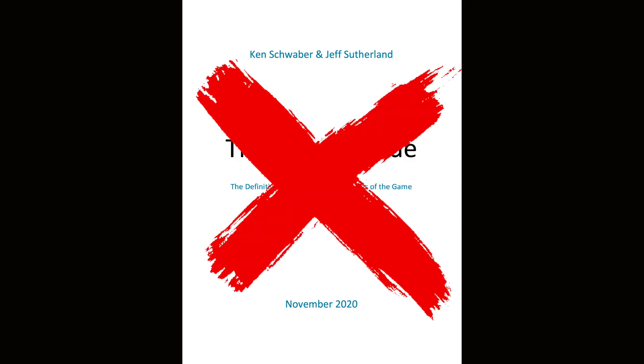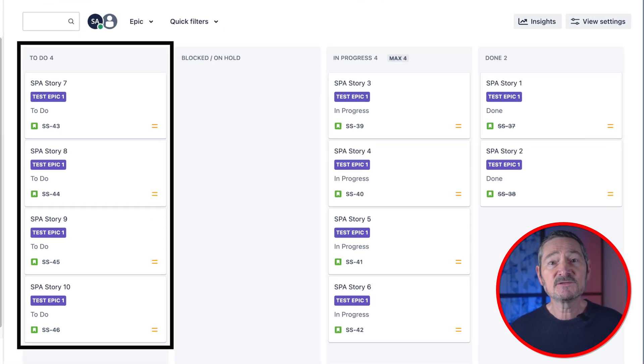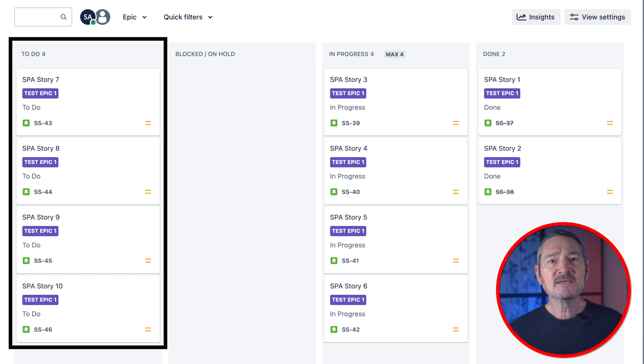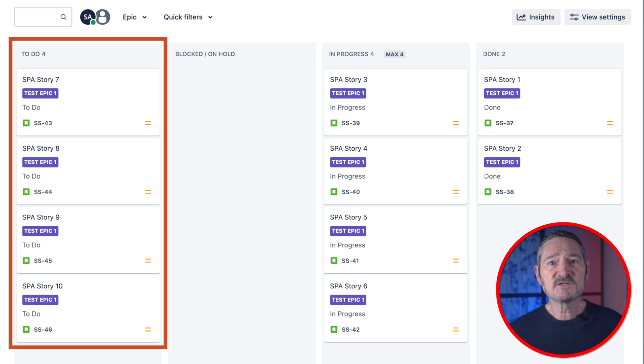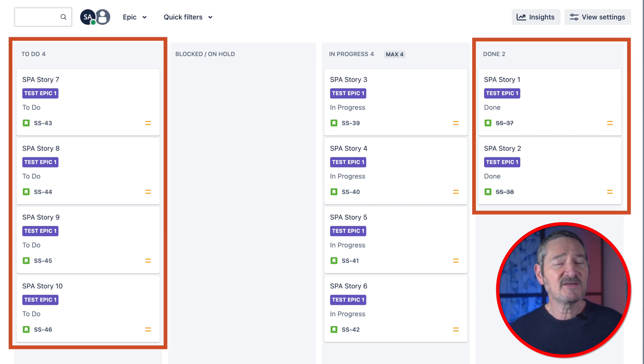If you're thinking we do Scrum so Flowmetrics don't fit into our process, think again. They are just as valid in Scrum as story points, velocity and burn down charts — none of which are part of Scrum or the Scrum Guide. This is a Scrum board. You'll notice that To Do is part of the sprint. When an item is taken into sprint at sprint planning, it's placed into the To Do column — it's queued, ready to start, but we haven't actually started it yet. If we measured from To Do to Done, all the stories would end up having very similar cycle times. Certainly their start date would be the same, and that isn't very helpful. We don't start all stories in sprint at the same time, and this is why we have a To Do column — but don't use it as our starting point for cycle time.